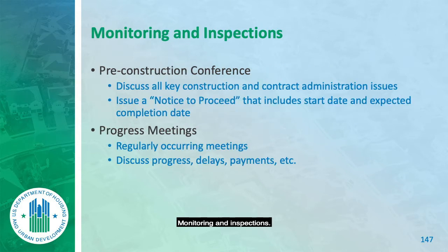Monitoring and inspections. Typically with construction, we'll have a pre-construction conference. It's after we've decided who's going to get the award. Sometimes it's after the contract is signed, though I don't recommend it. I recommend at the end of the pre-construction conference is when I'm going to sign the contract because we've discussed and agreed to certain terms and conditions so that the notice to proceed can be issued.